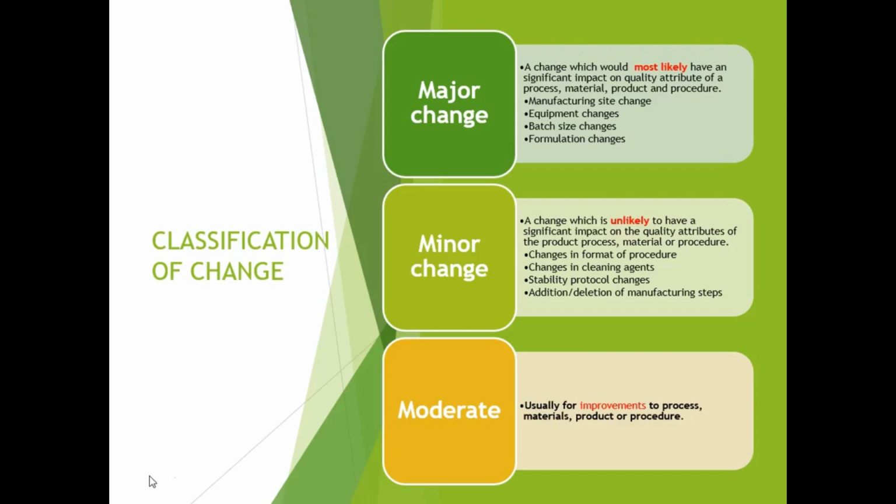So it's reviewed by QA at the facility level, and it has to be approved by corporate, and major changes require prior FDA approval. So if you're changing equipment type, for example, your dryer configuration or your blender type, you need prior approval. And also if your method is registered for related substances using, say, the HPLC method, and you want to change to a TLC method, well, that's a major change and requires prior FDA approval also. So they're just a few examples then of what a major change is.